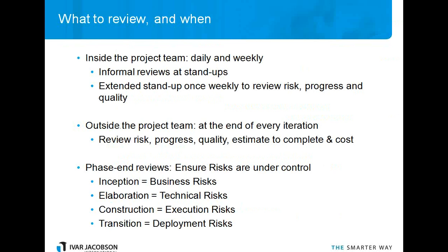Right. So then phase end reviews, you want to ensure that risks are under control. So each of the phases in the unified process, and we're big believers in that, is focused on a particular set of risks. So business risks in inception, technical risks in elaboration, execution risks in construction, and deployment risks in transition. So you would look at the risks broken out by phase to see by the end of inception, have we resolved all the business risks or at least brought them to an acceptable level, and similarly with the other phases. So these are the key things to review.